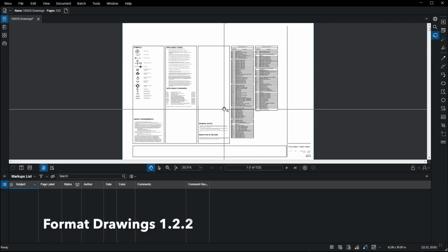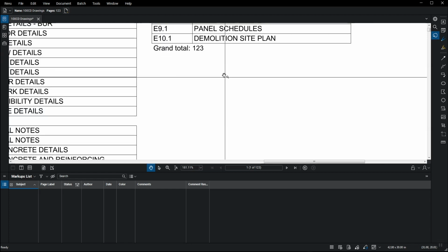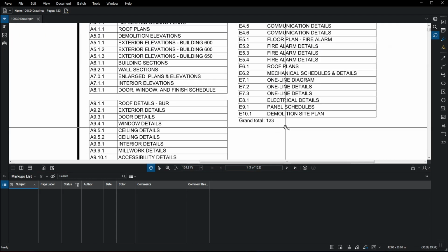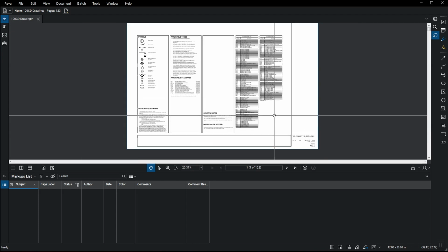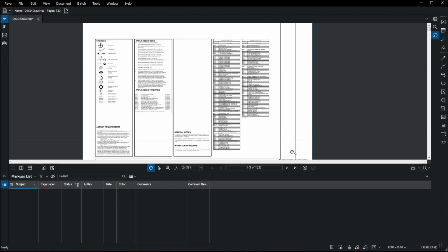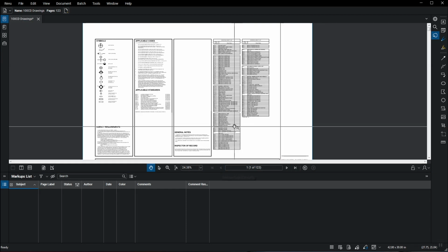Format the PDF drawing set. Prior to exporting to a PDF format, ensure that a sheet count has been included on the index sheet of drawings. Confirm that the sheet count matches the Bluebeam sheet count listed below. Also ensure that a 2.5 inch by 2 inch blank space has been left on every sheet in the same location for the DSA digital identification stamp.